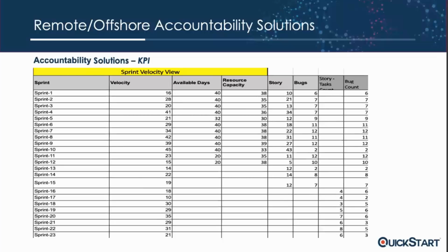I basically take that data from those reports and expand it a little bit more. I can see the sprint velocity at sprint level, but I can see whether the available days were the same or not. So if the number of days are less in one sprint, because we're doing 1 week sprints, because of 4th of July or whatever the holidays might be, or maybe a resource is not available, then I can match those and see that the sprint velocity on sprint 1 was 16, and 28 on the next one because the resource availability was higher or lower.